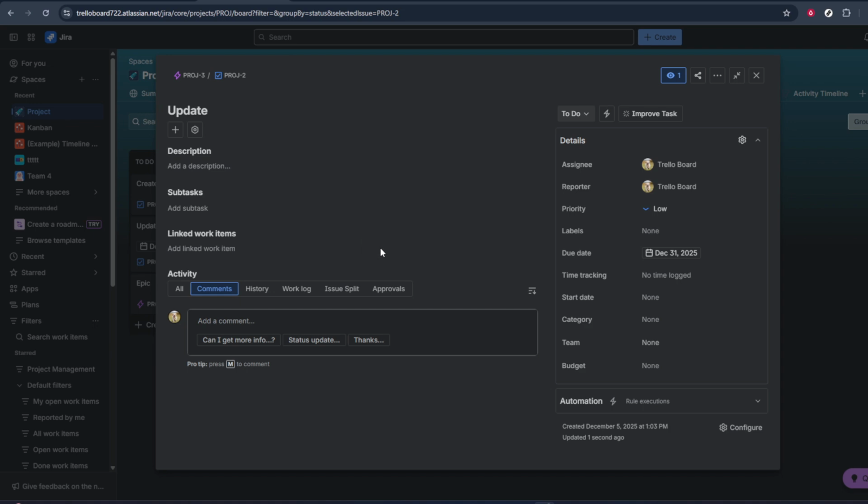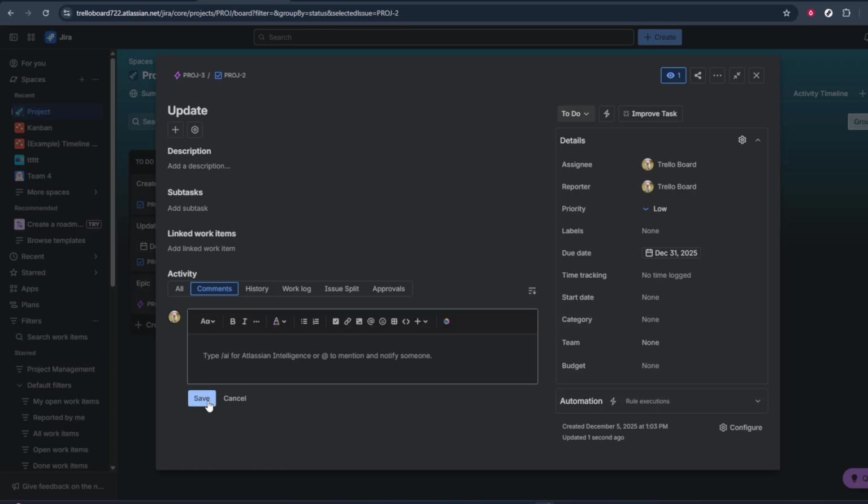In some Jira layouts, you'll see a label or a small field that lets you choose or add an epic. Here, click on the control that says something like Add Epic or Epic on the left side. This will open a small drop-down or input field where you can either select an existing epic or specify a new one, depending on how your project is set up.